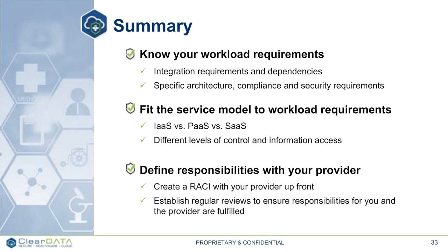And then finally, my recommendation is to create that RACI with your provider up front. Really map out your responsibilities. Sometimes you can even put that in the contract as part of the SLA. And then review that on a regular basis to ensure that the responsibilities that each party has undertaken are reviewed regularly, and help each other be successful along that journey.